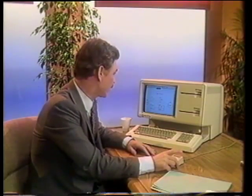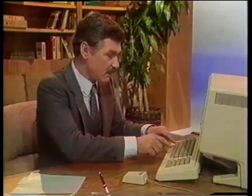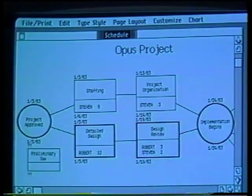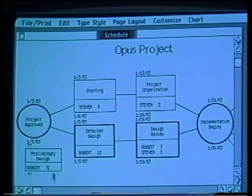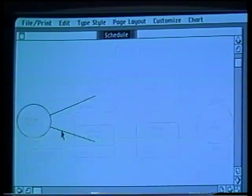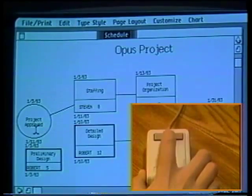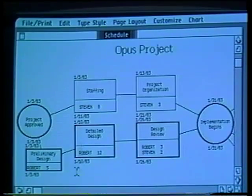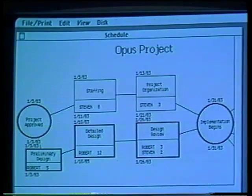To add a task to my flowchart, I draw this box with the mouse and enter the name of the new task from the keyboard. I can delete this old line using the mouse and draw in these new lines. The critical path is automatically updated to include this task. The heavily bordered boxes on the bottom show the connected tasks that take the longest — that's why it's called the critical path.